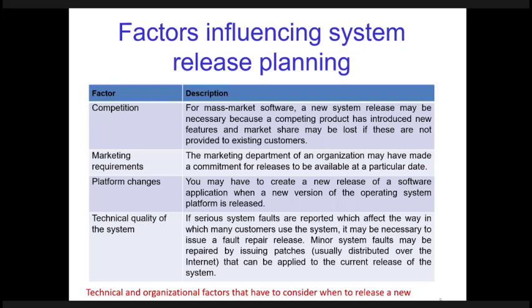Platform changes and technical quality of the software. If serious faults are surfaced, reported, which is hampering, which is disturbing daily business operations, then definitely you have to have an immediate fault repair release.